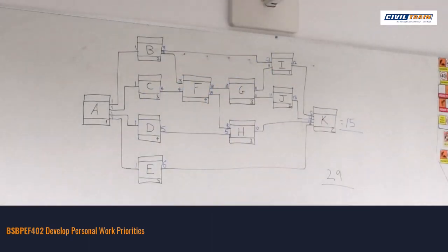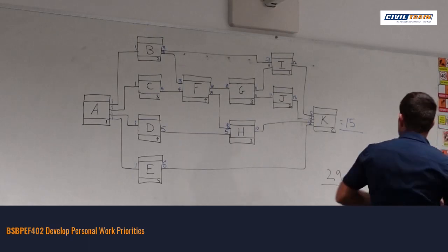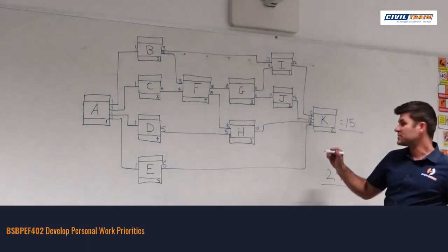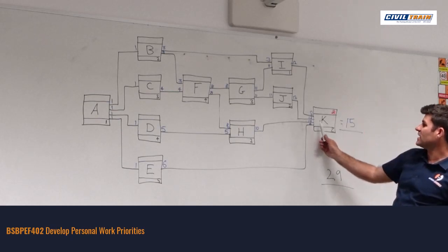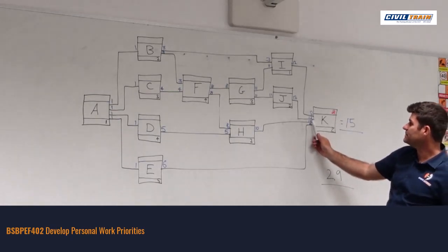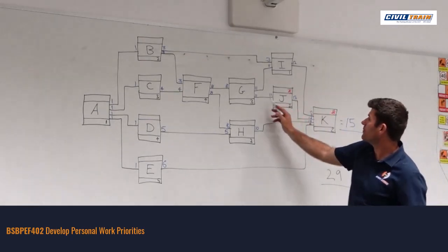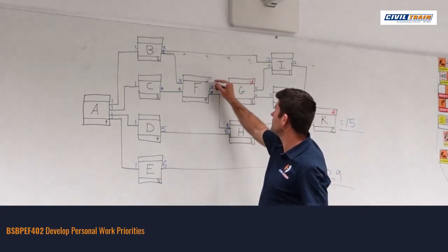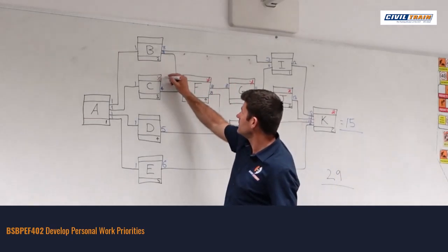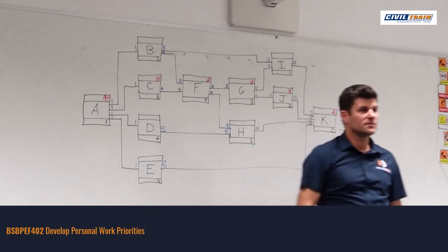So how we do that is we've calculated it, but what you've pretty much done, you follow that pathway. How we work out the critical path is we start here knowing that you work backwards. It has to be the last activity first, and then we follow the biggest numbers back. So we go 13, we go back, F, we're trying to get straight back to A, 4 is bigger, that's our critical path.